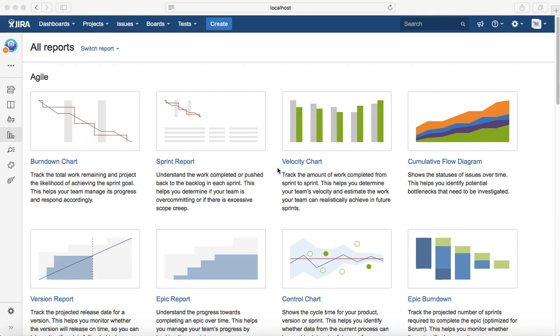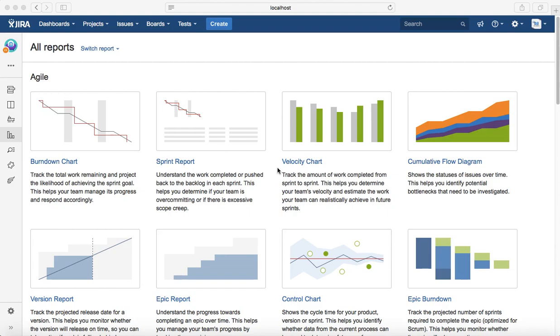For example, in Sprint 1 your team planned 20 story points and were able to deliver 18 out of those 20. Then next sprint they planned 24 and were able to deliver 20 out of those 24.